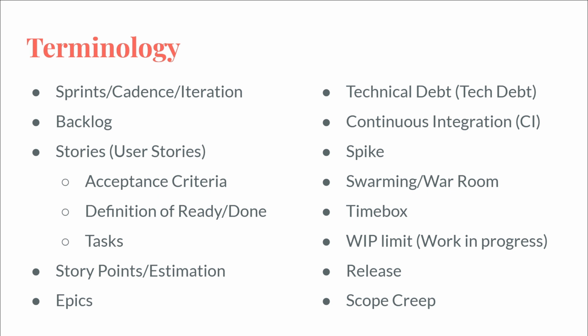A better way to think about it is that the larger this ticket is, the more variability there will be on how difficult it is. If it's a lot of work, then there's a greater chance that that work could be easy and maybe only take you 2 days, or it could be hard and it could take you maybe 5 days, right? Or it's a small amount of work and that could take you 5 minutes or maybe 20 or 30 minutes, right? But there's that window of time, and the bigger the ticket gets, the bigger that range becomes of how long it would take to work on it.